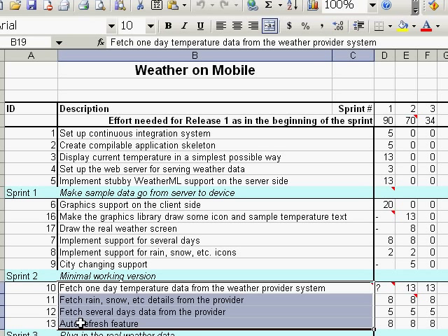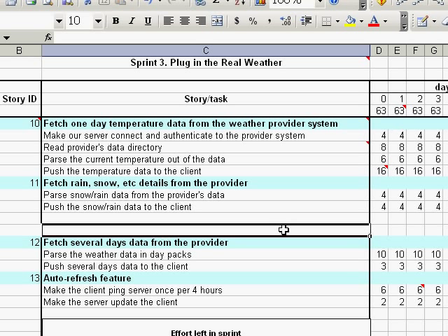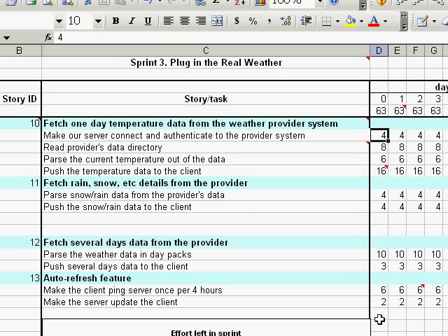During the second part of sprint planning, the team copies these stories to the clean sprint backlog template, just like this. Then the team figures out the tasks needed to complete the stories and estimates the task complexity in ideal engineering hours. After initial estimations, the list of tasks and estimations look as follows.